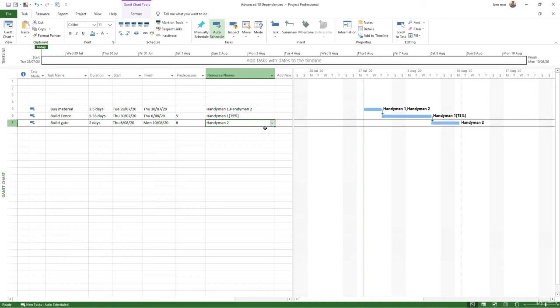When playing around with resources like this and percentages, you have to be very careful to save your schedule beforehand, because that can very easily mess up your end dates and the like, and you can get a little bit lost. As I was saying, I don't like to have my milestones and my project dates changing on a daily basis. It's very difficult to manage. I'd rather have a good look every week, but you don't want your end dates to change every time you go and update. So be very mindful with this.